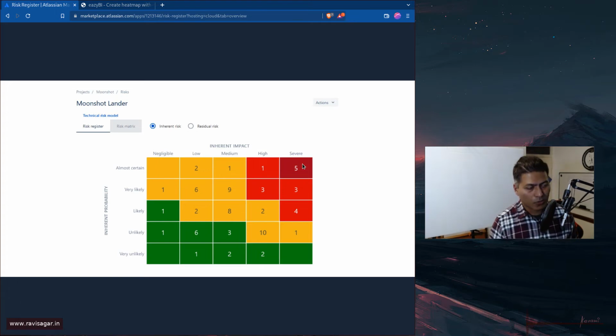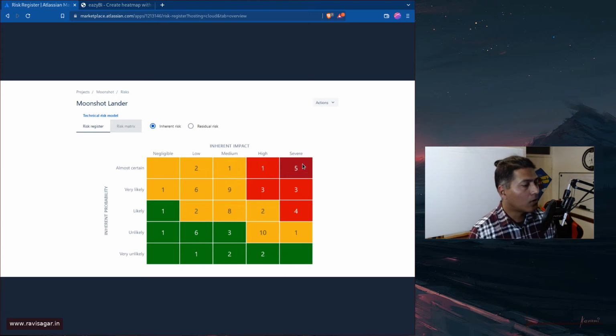So what you can do is either use EasyBI, or you can do it outside Jira in your Excel sheet, or you can have a third field. Maybe the third field will be a calculated field. How you calculate the number is up to you. Either you can use automation rules, or if you have, let us say, ScriptRunner for Jira, you can use a scripted field.